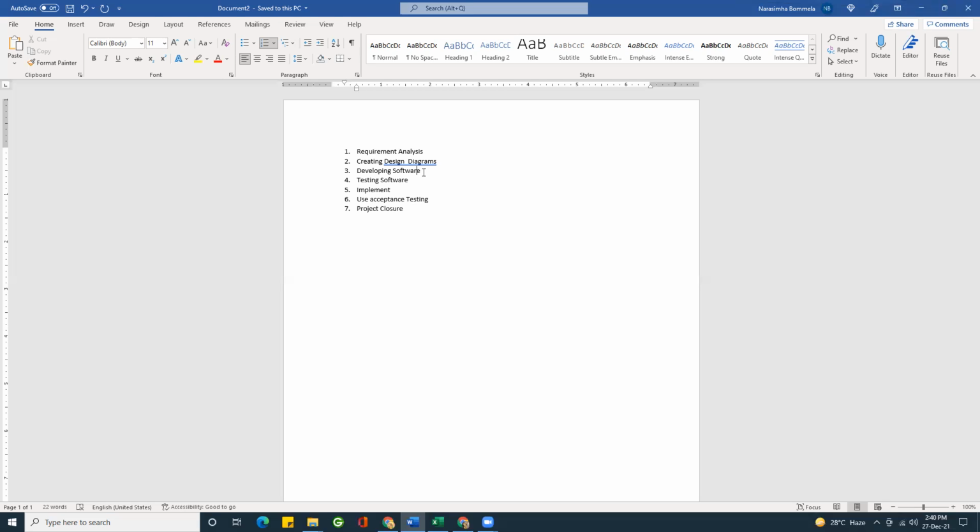In this way, we are supposed to evaluate what type of activities you are going to conduct as part of completing your project. To decide whether something is an activity or not, you will evaluate three important things: whether it involves any resource utilization, whether it requires a certain amount of time, and whether the selected activity has an outcome. It will take some input and provide us some output.